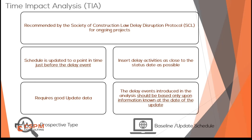This is where TIA shines. Time Impact Analysis focuses on the most recent schedule update before delay events occur. By doing this, TIA provides a snapshot of how the delay will affect the project at that specific point in time, rather than relying on a potentially outdated baseline. This is especially important in complex projects where multiple changes and updates occur regularly.